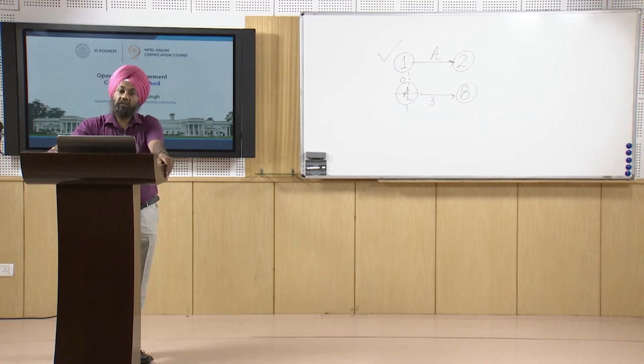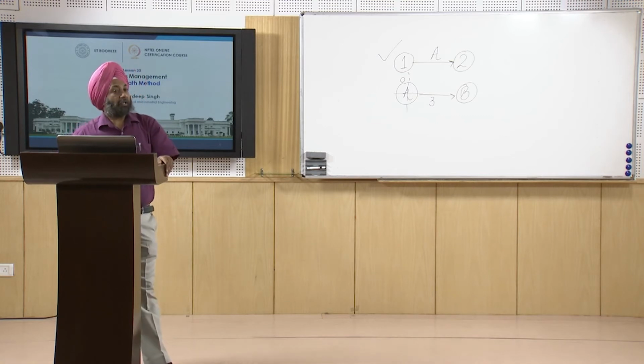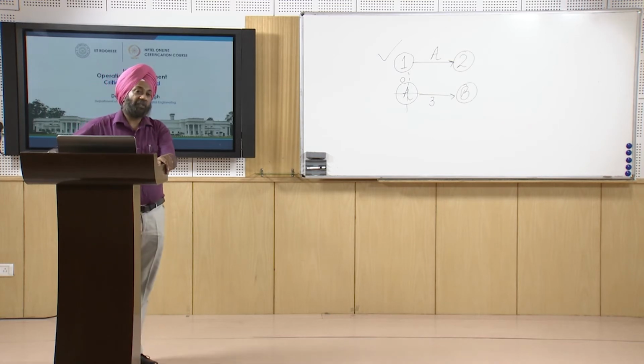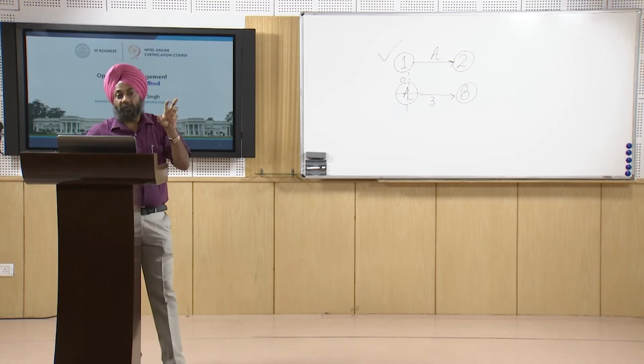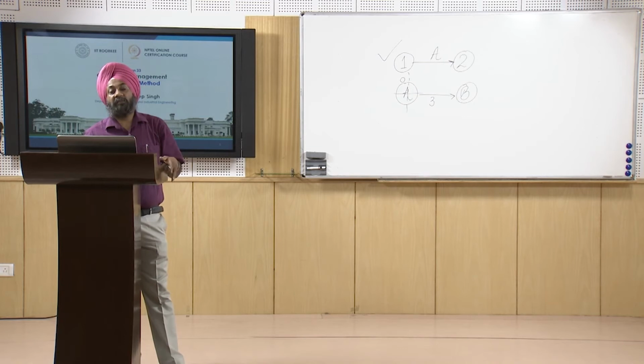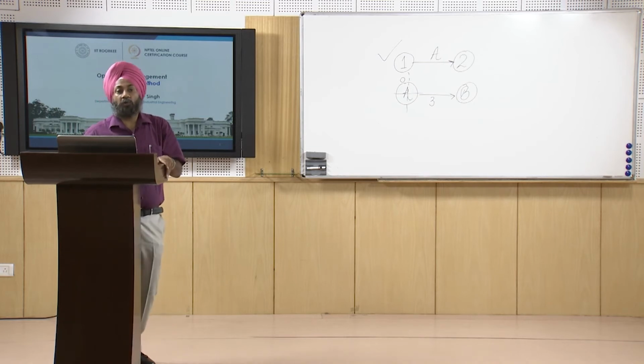And third, as we all understand, we must have the information regarding the precedence relationship, that is the predecessors and successors for each and every activity included in the project. So we require the list of activities, the time required for each activity, as well as the relationship among the various activities in order to draw the project network.